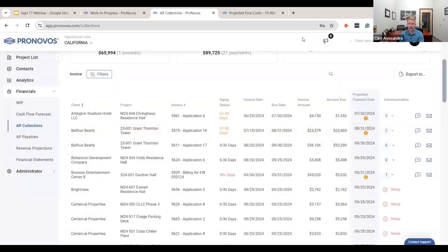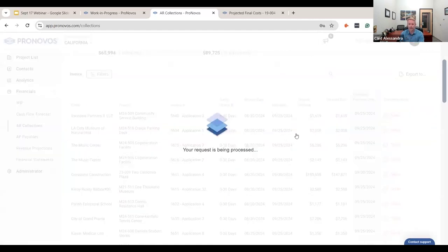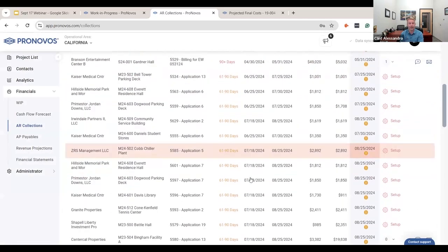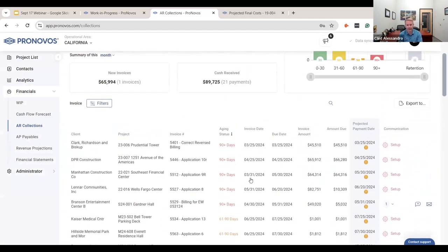It actually increased our, I like to use the word touches, right? So it increased our touches with that customer of, hey, just a reminder, we need some payment from you for this project. It's already 61 to 90. Internally, for 0 to 30, we're not as worried. But 30 to 60, we're like, okay, here's a reminder. 60 to 90, okay, now we need to talk. Where's that money coming, right? Because now you're affecting our cash flow.